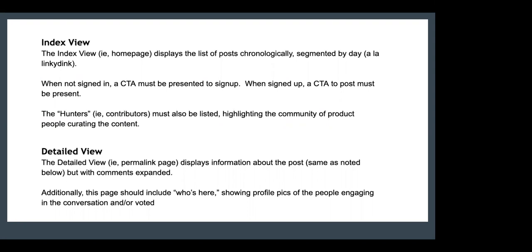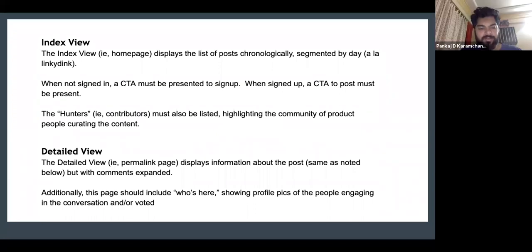And then when actual development has to start, I take the starting part, for example, login, sign up or registration. We get those designs made, and after those final designs are made, we start the first sprint. And while the first sprint is going on, you take up the next part, which is the podcast list. So whatever is not being worked on in a sprint, you can get designed during that sprint.